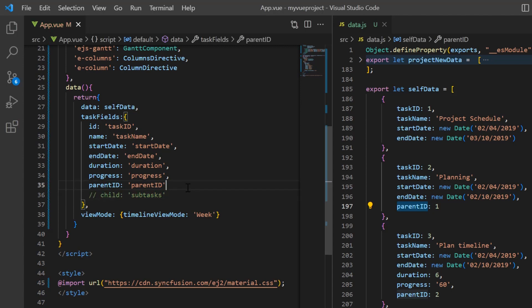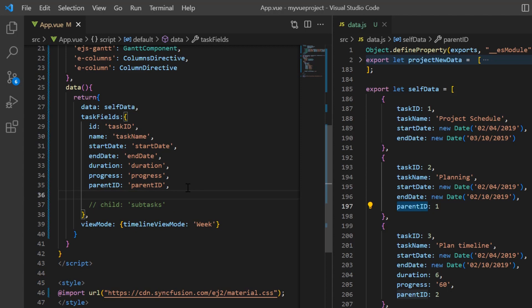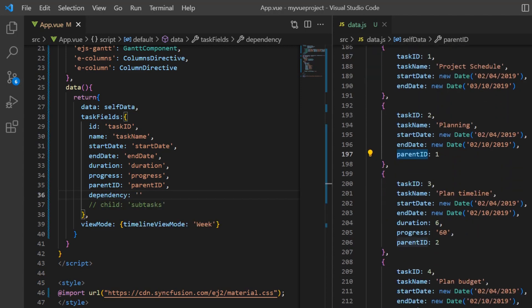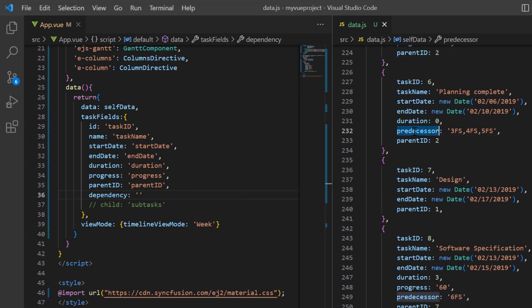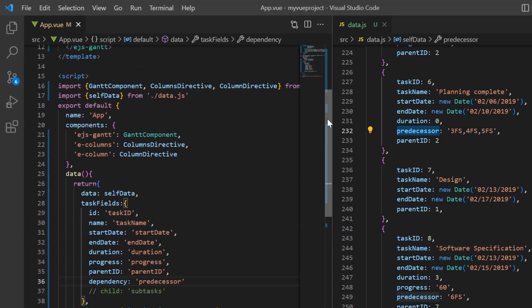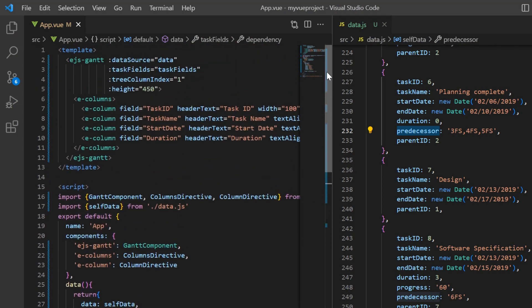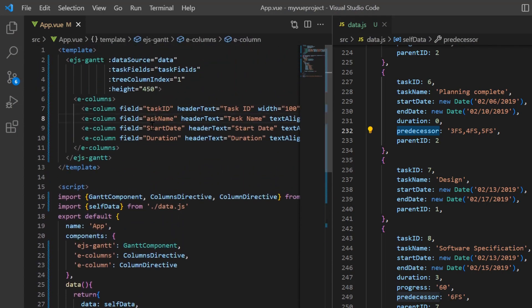At last, I add the dependency property in the task field settings to display task dependency in the timeline and map the predecessor field from the data source. Also change the casing of the field property values in the E column tags.